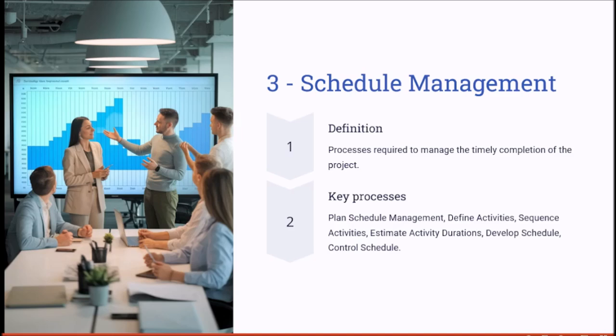Next, we have developing the schedule. After you complete all of these processes, you will be able to develop the whole project schedule. That analyzes the activities that you have identified and their sequence, their duration, the resource requirements, and the schedule constraints to create the project schedule model.